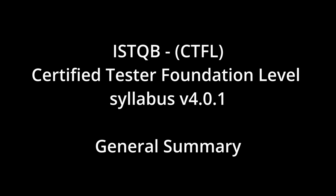Well, it serves several purposes. It documents the means and schedule for achieving the test objectives. It ensures the test activities align with the overall project goals and exit criteria. It acts as a key communication tool for all stakeholders. It forces you to adhere to any organizational test policy or strategy, or explicitly explain deviations. But maybe most importantly, it guides the tester's thinking and forces the team to confront potential challenges upfront, like identifying risks, figuring out resource needs, estimating effort and cost, and planning the schedule.